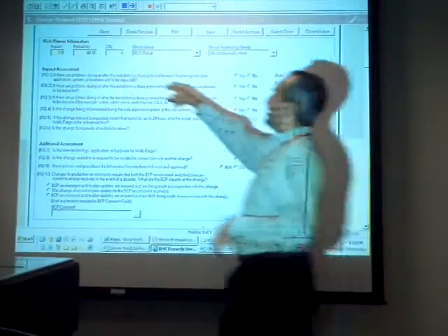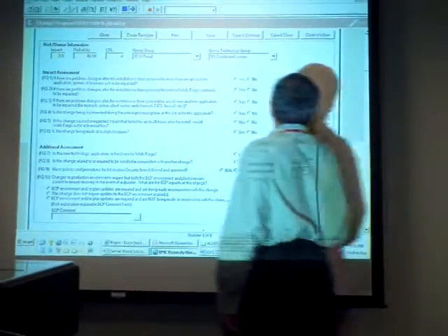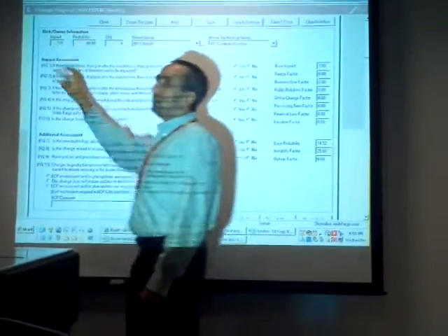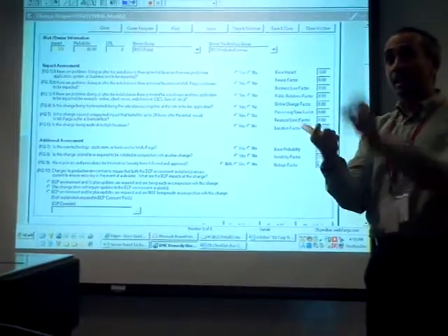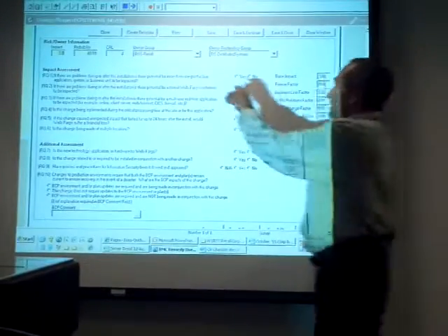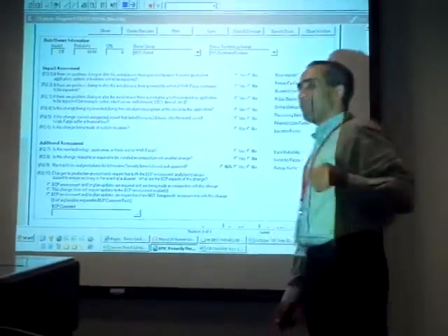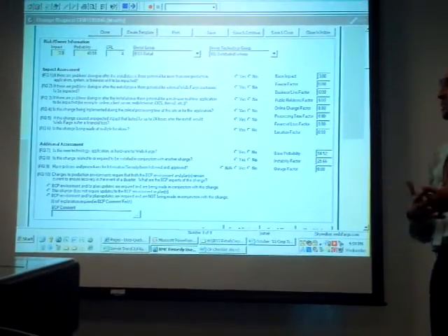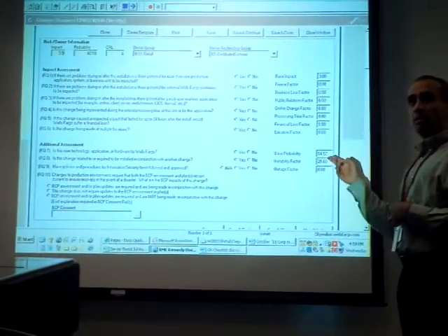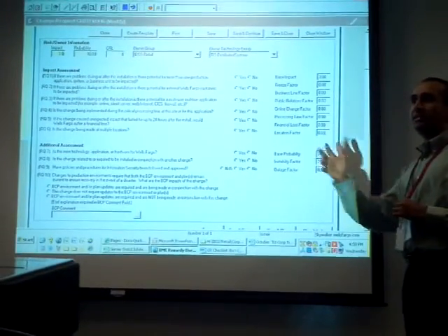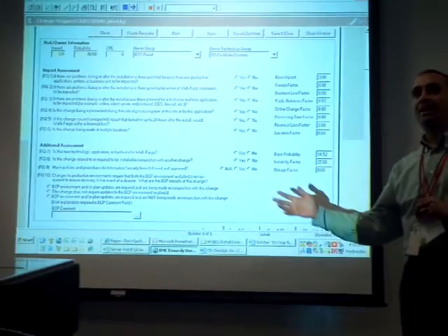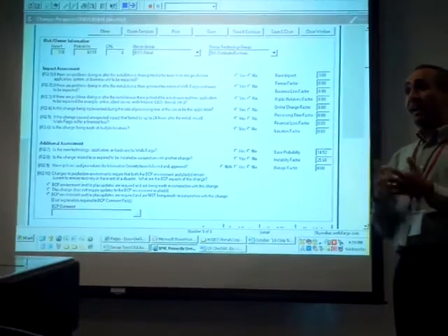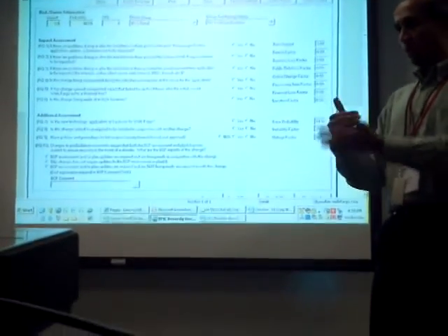So this is a sum of all of these numbers. You multiply the impact and probability to get something called a risk, and depending on the risk range, there is something called a CRL that gets calculated. The more failures you have, the more changes that are unsuccessful, these numbers go up. They classify that this group's changes have been usually problematic. Another variable that ties into your calculation is the asset. If that asset has had problems, right, you have many incidents that are